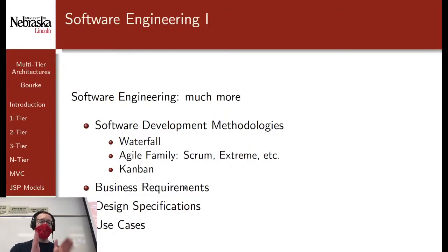We've got sprints, 2-week sprints, in which you have a plan at the beginning of the sprint. That's done for you. I tell you what you have to do for the next 2 weeks. At the end, you have deliverables for that phase, for that sprint. And then you have retrospectives, and I kind of take on that role as well by posting a retrospective at the end of each phase.